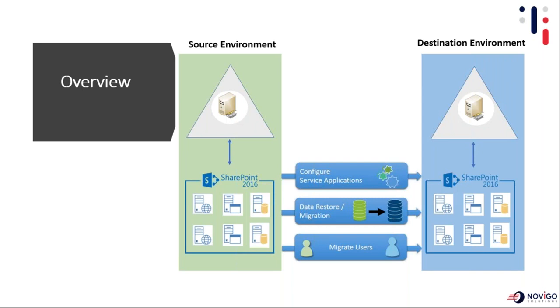Then you need to create your servers in the new domain. There are two options available here. Either you can set up fresh virtual machines on your target domain, or if you have enough resources available, or if you are using the mid-role architecture, or if you have a UAT or a DR environment set up, you can actually disconnect your existing servers from the config database and change the domain on those servers, and then join them to the new domain and join to the new configuration database.